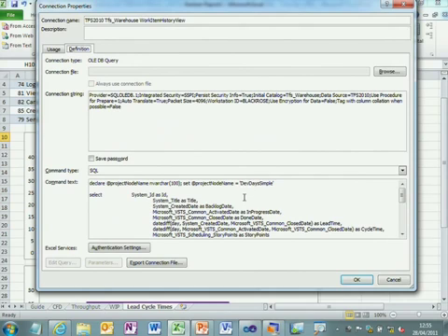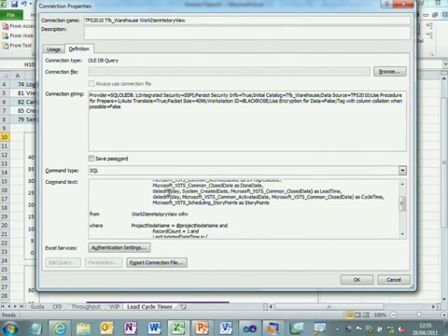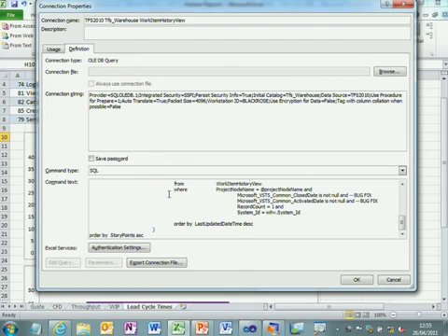What it's doing is running a query here, and it's just bringing back all of the work items that are completed, but it's also measuring the lead times and the cycle times. When I was showing you the TFS process editor, those extra rules that I put in to store those times allow us to pull back this data. I can't work out a way of getting lead times and cycle times in a per work item way out of the cube. I think they're aggregated away in the cube. If someone knows how to do it, mail me.